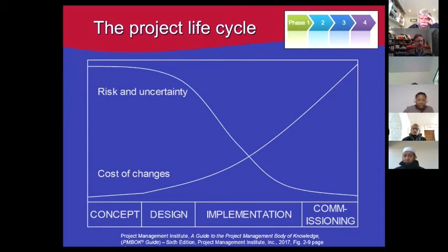That's very good, yes. As you move through the project, you mitigate risks and risk becomes less and less. A very simple example of this: you're doing a building project on a site with a lot of underground services. You've identified that as a risk, or maybe it's the risk of encountering unexpected bad soil conditions. But once you've laid the foundations and you're out of the ground, that risk is past. Whatever happened or didn't happen, that risk no longer exists. So that's yet another risk that has been worked out of the system.